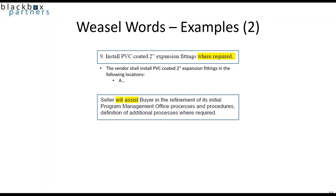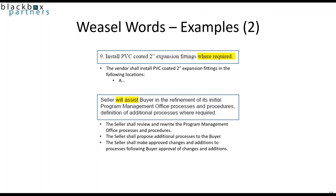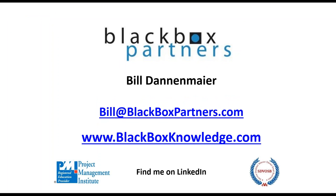Here's another example: 'Seller will assist buyer in the refinement of its initial program management office processes and procedures. Definition of additional processes where required.' We're just 'assisting,' which has no concrete element to it, and 'where required' gives it no end either. Instead we should write: 'The seller shall review and rewrite the program management office processes and procedures. The seller shall propose additional processes to the buyer. The seller shall make approved changes and additions to processes following buyer approval of changes and additions.'